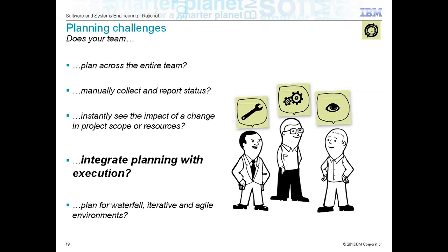And the moment you close the defect, the moment more enhancement requirements land in your collaborative lifecycle or application lifecycle management platform, your project plan should reflect those changes. The moment you close 10 user stories saying done in the agile world, your project plan should reflect that. That was not happening. Project planning was not tied to the execution.